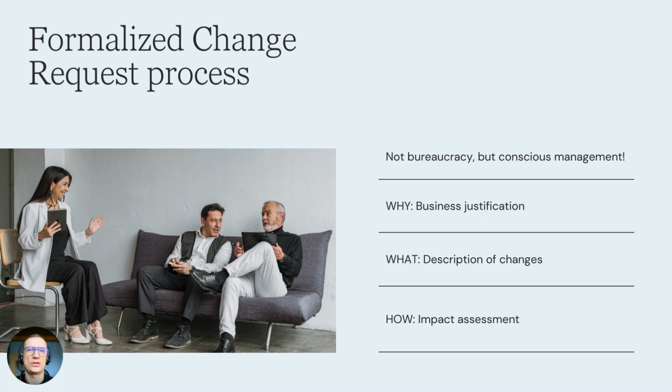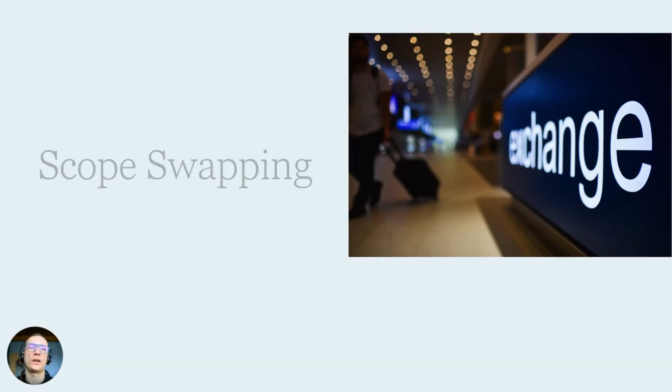Well, you have to manage those changes. We do this change, not that one. We do this one first, that one later. So normal project work. It's worth it for such a change request to have the business justification, why we're doing it, what we're doing, meaning these changes described, and what impact it will have on the project. Then we are able to make a decision in a conscious way